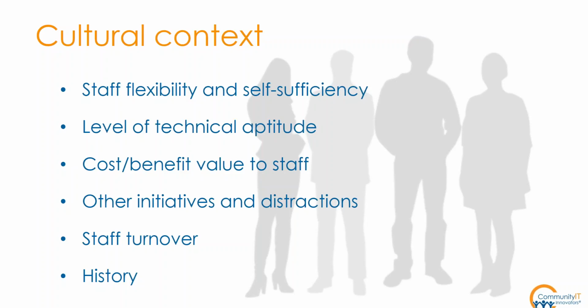Yeah. You might be able to sell the idea, but it depends. That's another cultural factor: do you have a collaborative organization? Do you have a command and control organization? That makes a difference in terms of how you implement your new IT system. If you have a collaborative organization, but you take a command and control approach, Dropbox is over, we're going with OneDrive, you need to start using it tomorrow, end of discussion, if you try to deliver that message into a collaborative environment, it's not going to work.